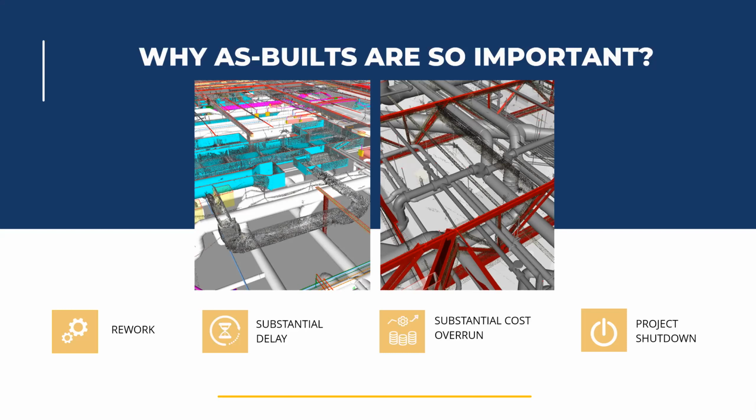To fix this problem, a substantial redesign effort was required. After the redesign, we needed to go back and re-coordinate everything. It is obvious that the redesign and the re-coordination would have a schedule impact, and the client had already paid for the design and the construction services that had occurred. All this rework would add a lot of extra cost for the client. Because of the substantial schedule and cost impact, the project ended up being shut down. It is unfortunate, but what may surprise you is that this case was not an outlier.